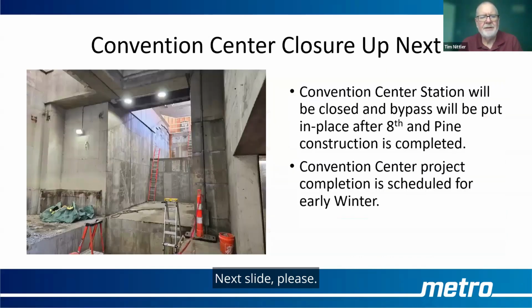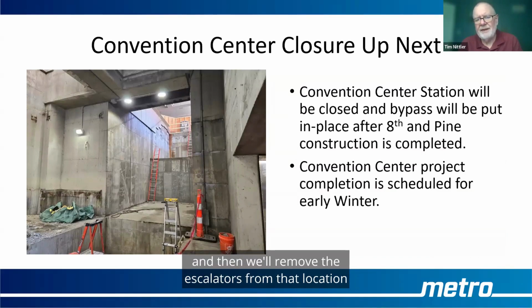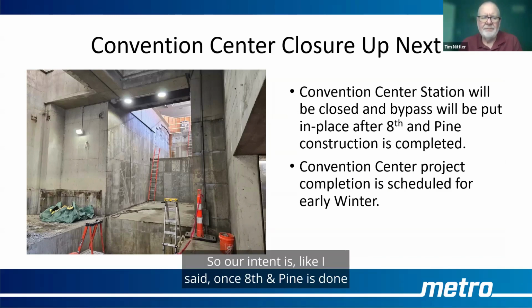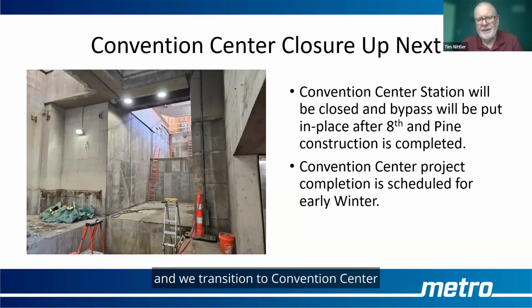Next slide, please. So similar issue at Convention Center. We'll close the station, we'll set up a bypass, and then we'll remove the escalators from that location and build staircases back in as well. So our intent is, like I said, once 8th and Pine is done, we transition to Convention Center sometime in the middle of the fall.